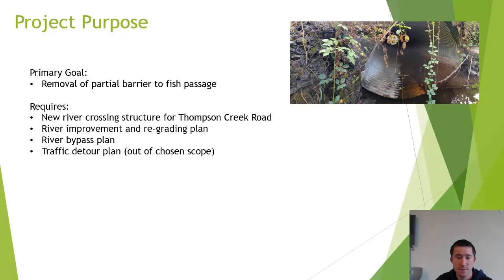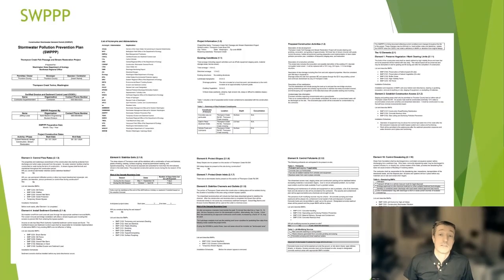Due to time constraint, the traffic detour planning was discussed but not pursued as part of our design and plan package. Part of the environmental aspect of this project is the permits required for construction to begin, one of which is a stormwater pollution prevention plan, or SWPPP.